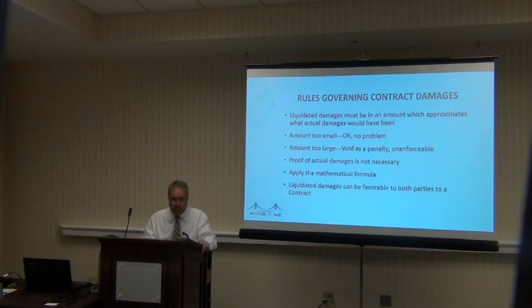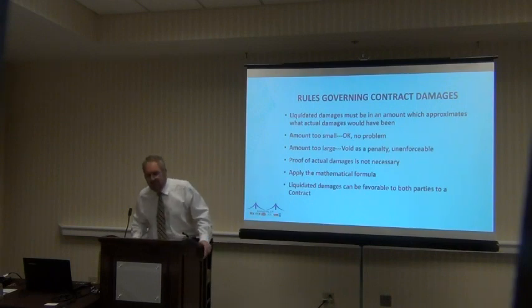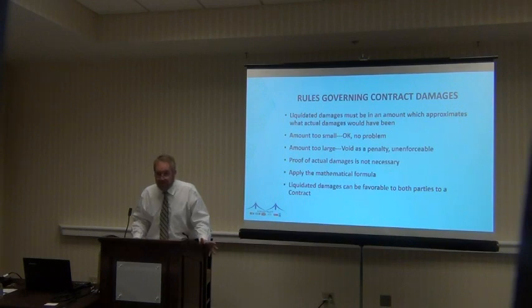They have to be somewhere in the ballpark. And there's latitude on it. That's not tight. But up here I have, if the amount's too small, don't worry about it. If it's the owner's liquidated damage clause, the owner's not going to be able to go into court and say, well, I didn't put a big enough number in there. It should have not been 10,000 a day, it should have been 100,000 a day because this is an NFL football stadium. Well, Mr. Owner, sorry, you got your chance. Now you're just trying to take an end run and seek to get actual damages when you have a liquidated damage clause, and we know the rule of law is you can only get one or the other, you can't get both. So King's X, you're out of that deal.